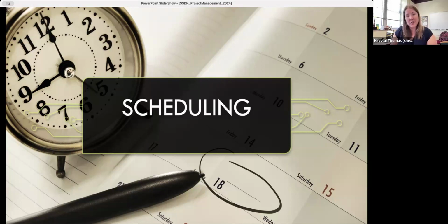So we take the stages of the project as drafted in the project task list that you just saw, and we use our timing documents to determine hours for each of the different steps in the digitization workflow that we have. So that includes prepping, digitization itself, image processing and quality control of the images, the metadata creation and processing, the loading into our digital library platform, the ingest quality control to make sure everything actually loaded the way we thought it was going to, and then the close down steps.